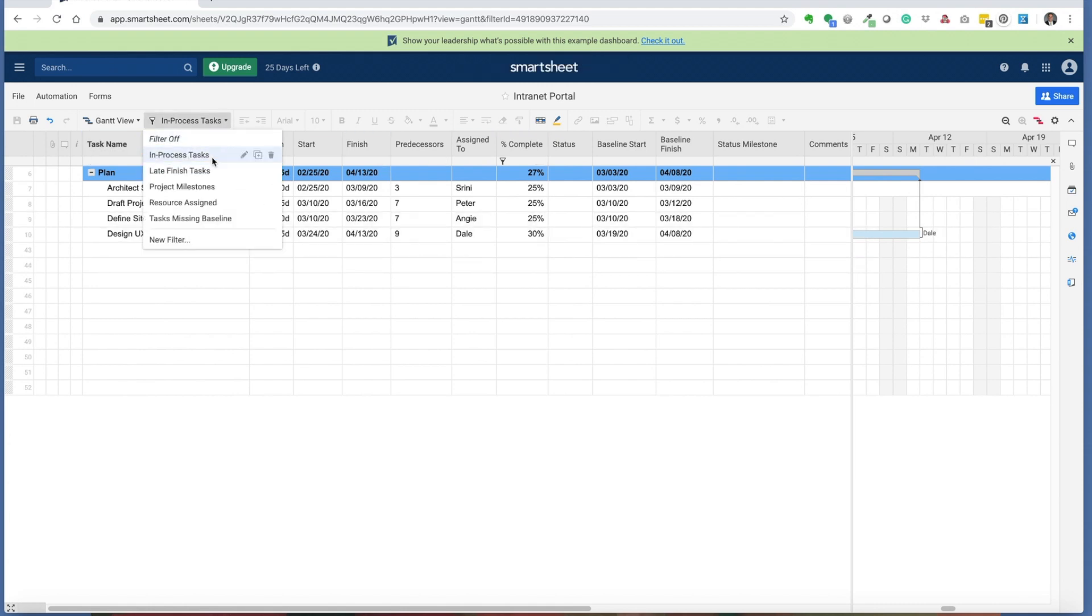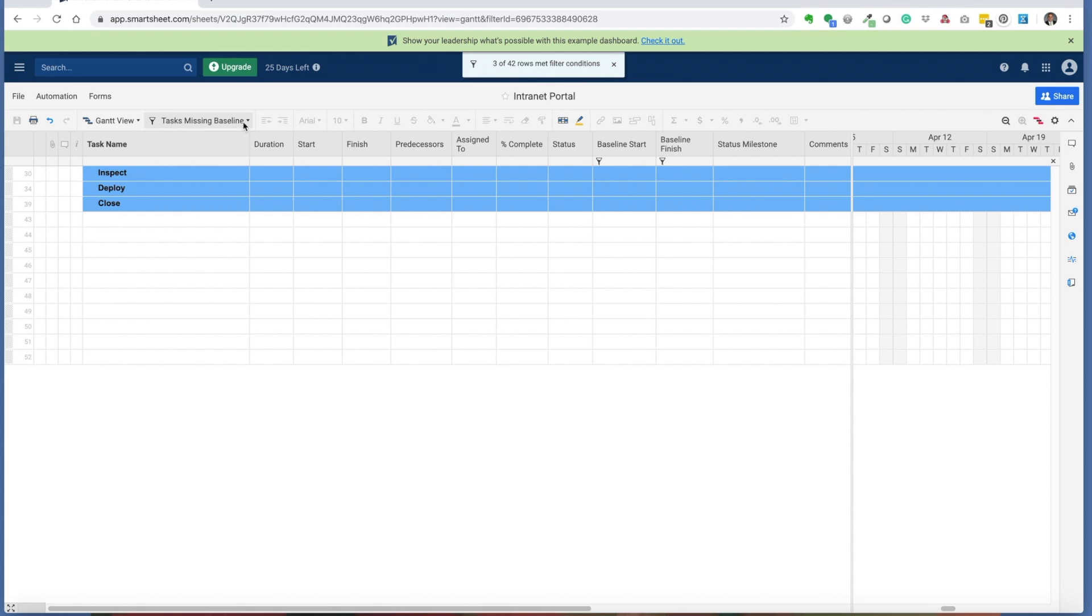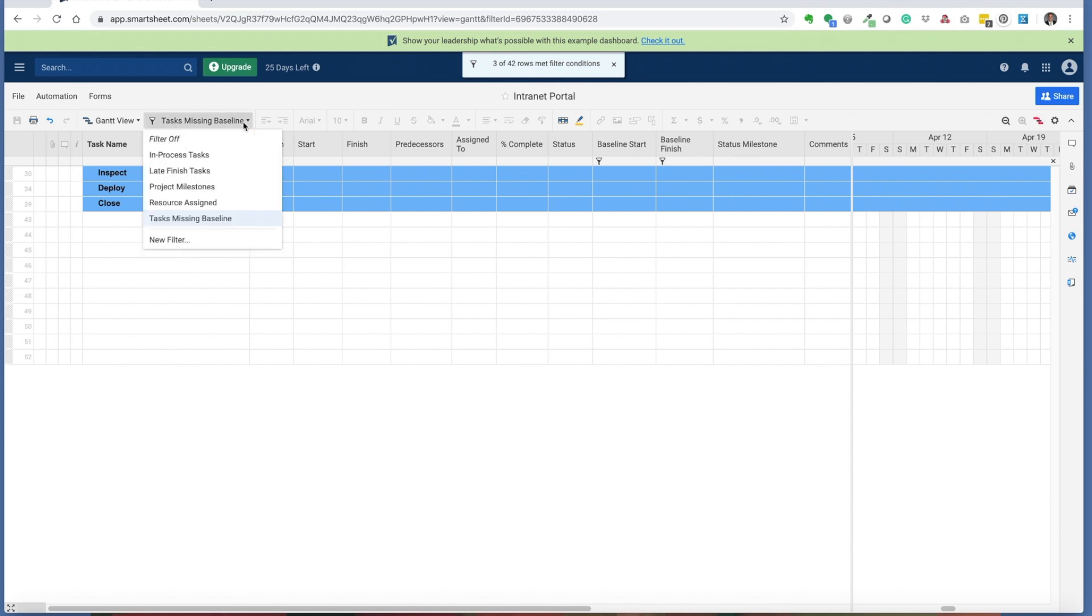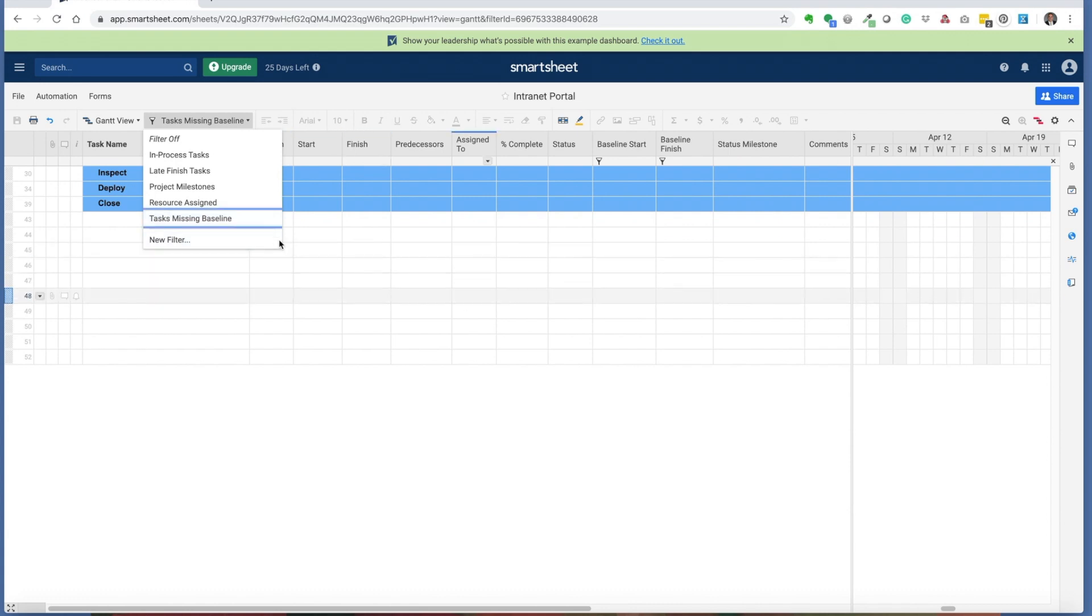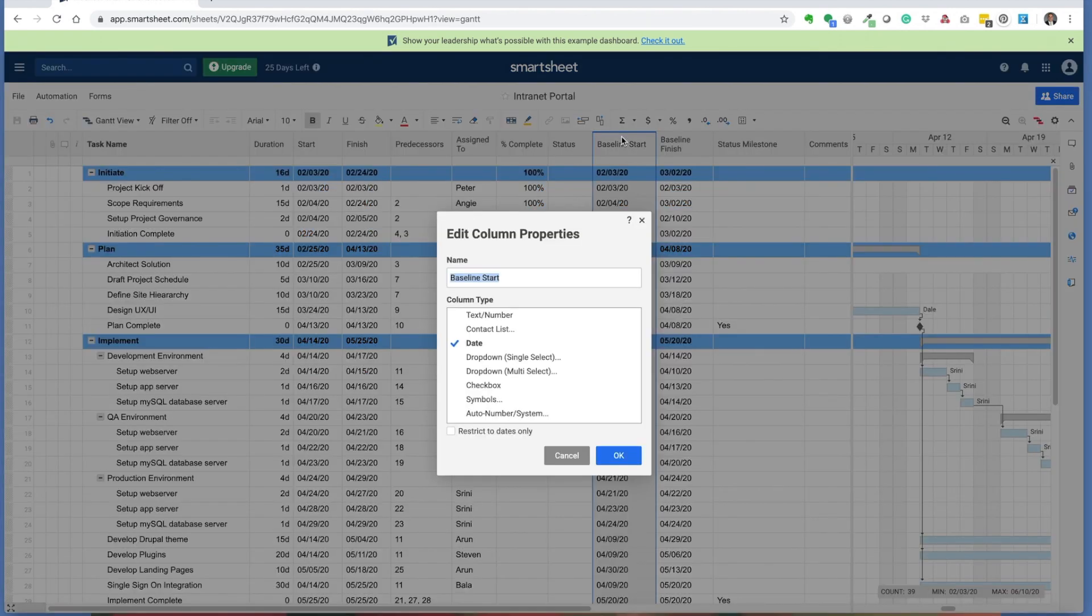The next filter is the task missing baselines filter. This shows me which tasks are missing a project baseline. Now in Smartsheet, it's not like Microsoft Project, so it doesn't have a baseline start and baseline finish field by default. What I had to do was actually create a baseline start and baseline finish column in my Smartsheet.